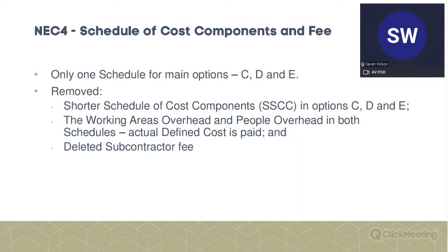That's now been removed, and you've got to look at actual cost. I think that's a retrograde step, because anything where you can simplify it and use percentages instead of actual cost, particularly where it's likely to be a relatively small cost, is good. If you remember, we were talking about things like the cost of water, electricity, where we can percentage those instead of having to prove actual cost. But it's been removed. So I'm sad about that.